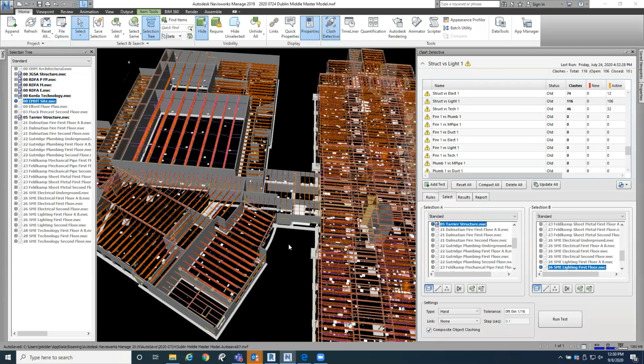I am on the consulting side, and I do agree that most contractors tend to take the design models, throw them out, and then build everything from scratch, following the design intent. And I think the reasons are valid. I understand that most designers do not fully understand construction, or even simple things such as fitting types that can be used, and how you can roll up or roll down a pipe or ductwork. Therefore, it's much easier for the construction team to rebuild the models.